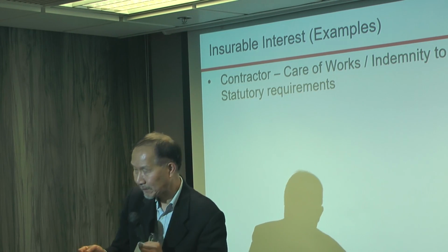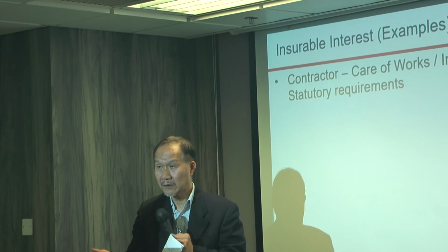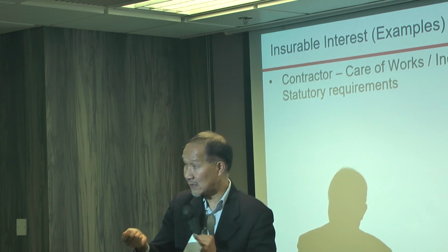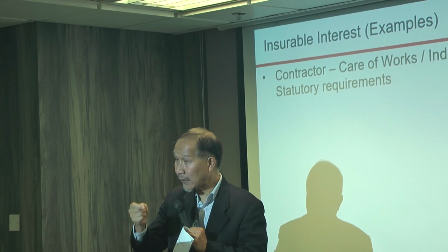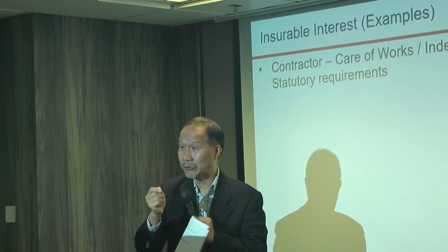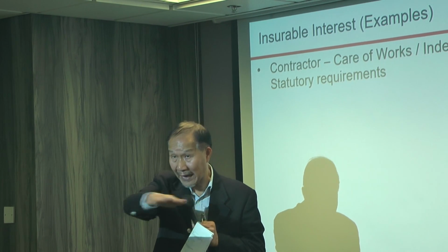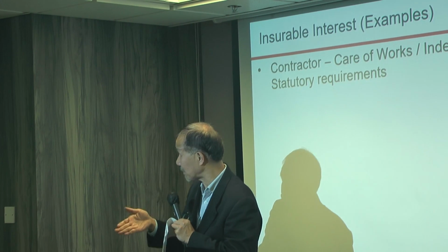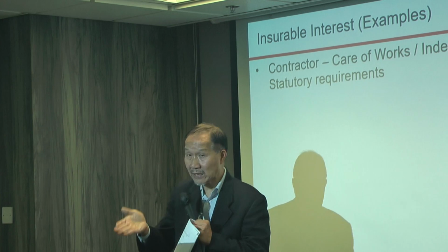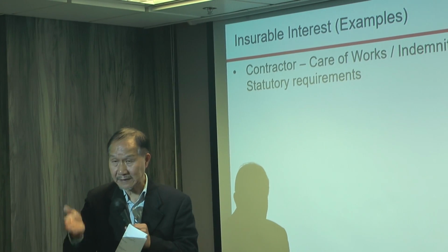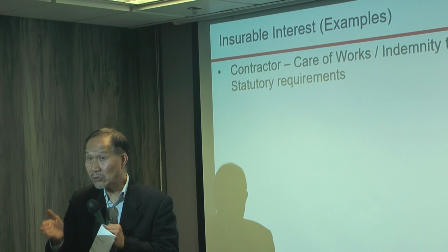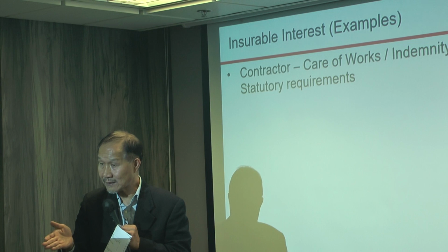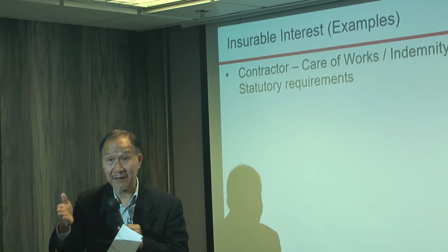Take a daily case: your flat is going to have a renovation. You don't have a house these days in Hong Kong. You give the key to the contractor. Theoretically speaking, before he hands over the flat to you, the contractor is in charge of the flat. When you are in charge of a flat, you are under total responsibility. If anything happens, somebody gets in and gets hurt, or somebody gets in and takes something away, the contractor has to be responsible. Any losses, you will ask the contractor to indemnify you.